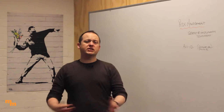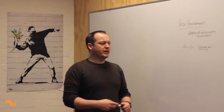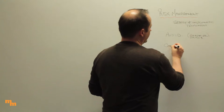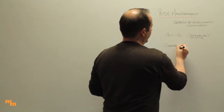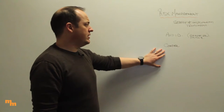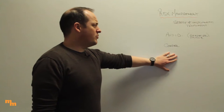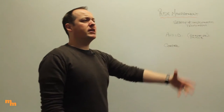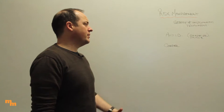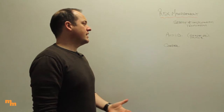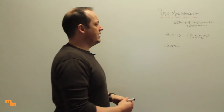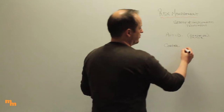If the risk is too great and we don't want to face that loss, we just don't do it. That could involve termination, non-initiation, or withdrawal from an activity — you might have to shut things down for a day to fix them. That's the most extreme measure: just avoid. The next option is deciding we still want to go ahead with the activity, so can we just control the risk?